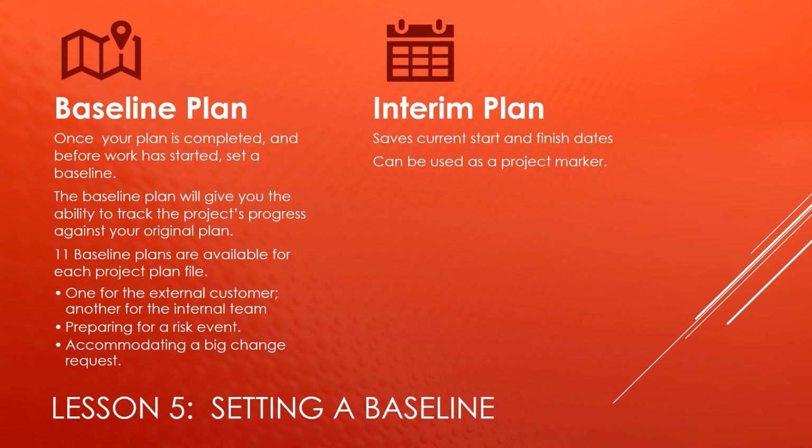So this lesson is all about finalizing your project plan. And so the next step in finalizing your plan for certain is setting a baseline plan. Now, you may or may not need an interim plan, but you're definitely going to need to set a baseline plan before work starts on your project. And that is the only way you'll be able to track the progress of your project.